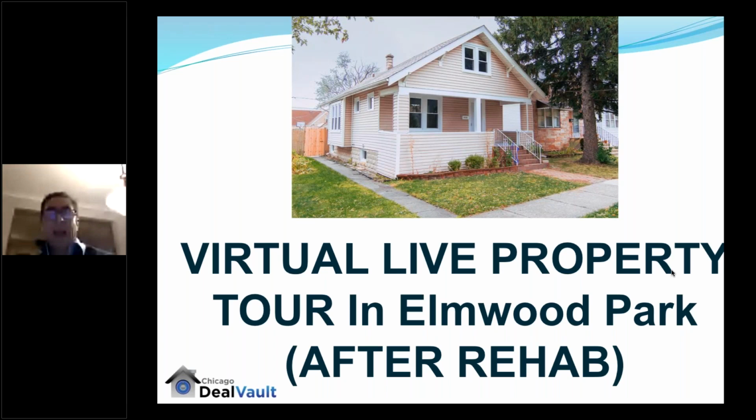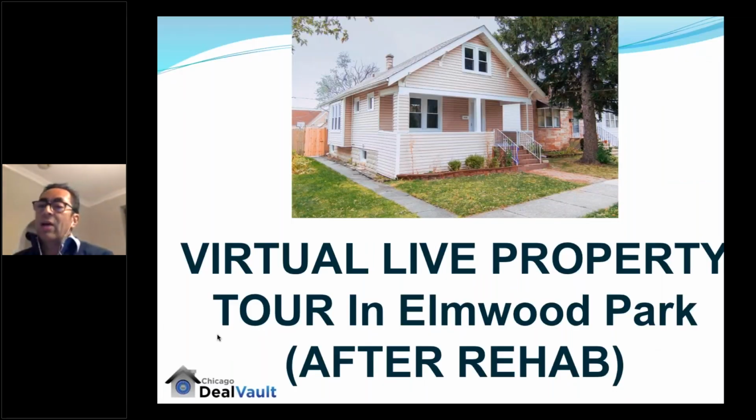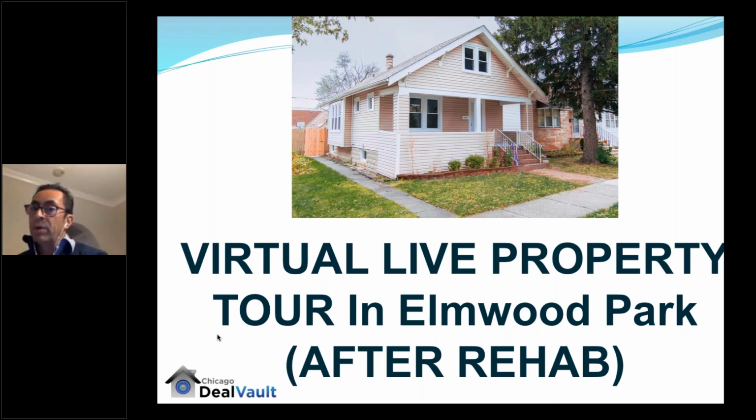Now we used a Harmony lender. They gave us the money for the purchase up to 90% of the purchase, or 80% of the rehab. But guess what? When I did the scope of work, I did not account for brand new windows. So we didn't get the $45,000. We only got $39,000. So that was my bad. You have to do the scope of work as accurately as possible, but in this case, it was my bad that I did not account for the windows. So out of pocket, pretty much close to 6,000 to 7,000.